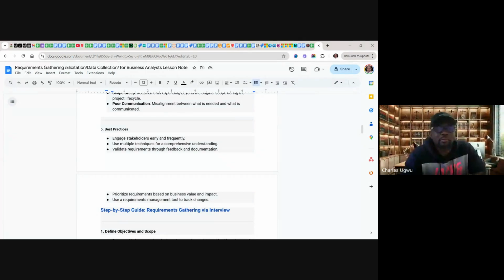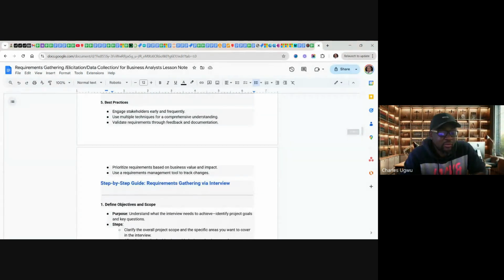Maybe during the requirement gathering, you might have taken a small shot of one bottle of Hero in order to clear your eyes and face the large audience. And when they start saying A, you start writing B. And after the documentation, you have captured a lot of wrong requirements. So there is need for validation. You must send it back for them to review and say, yes, this is what we wanted, before you move on to requirement analysis.